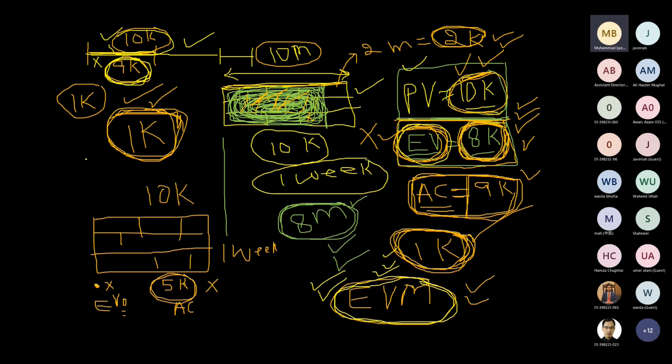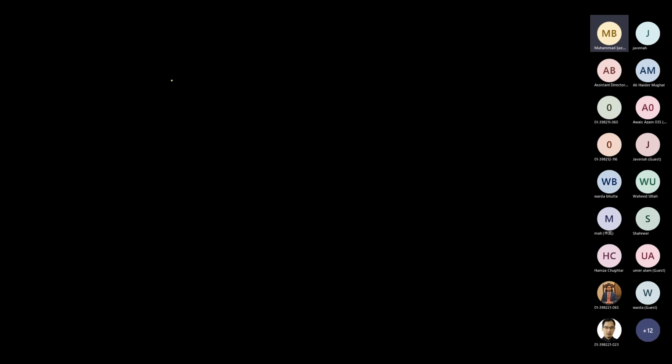So now the point is that it is not only earned value management that is used. There are many other mechanisms as well, right? When you don't use earned value management, I'm making it blank again. If you're not using it, then we generally plan a budget or make a cost baseline such that, okay, in the first quarter, first month or first week I would require this much, in the second month this much, and so on. So that cost baseline has a different picture.